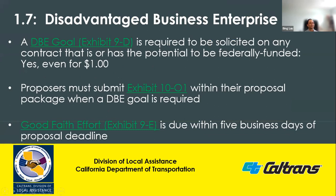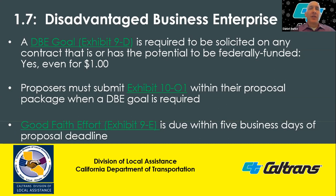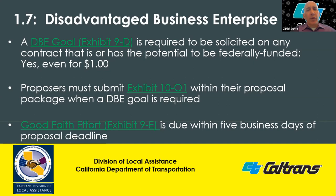Section 1.7 of the Contract Manager Quick Reference Guide covers the Disadvantaged Business Enterprise briefly. We suggest going to LAPM Chapter 9 for more detailed information. For any federal aid contract, even if it has as little as $1 of federal funding, or if there is the potential for it to be federalized, the entire contract is considered to require the DBE goal. Even if it is as little as $1, it does need to have a DBE goal.